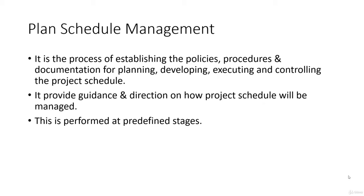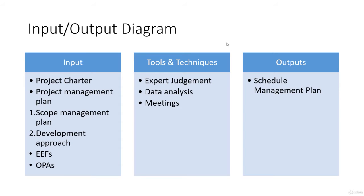This is performed at predefined stages — usually at the initial level of a project. Looking at the input/output diagram: inputs include the project charter, management plan, scope management plan, and the development approach, which is very critical. External environmental factors are also critical — changes in government policies, major societal or economic issues can impact project delivery. Organizational process assets include the templates and tools a company uses; better tools make coming up with a timeline much easier. For tools and techniques, we use expert judgment, data analysis, and meetings.